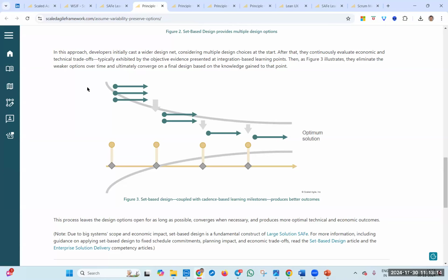Yes. And if you look at the picture, here we identified 3 options or 3 solutions, and from those we did a POC and started going ahead with the next 2. So the uncertainty curve got reduced because we got some clarity. If not 100%, at least we got some clarity. We started working on that, and as we experiment, we get more clarity. So that uncertainty cone will be reduced slowly, steadily.